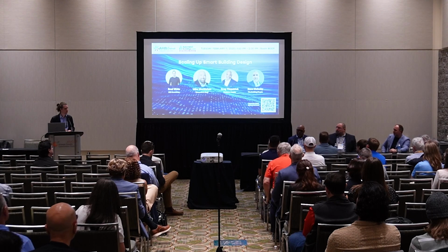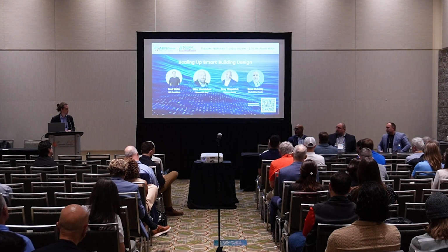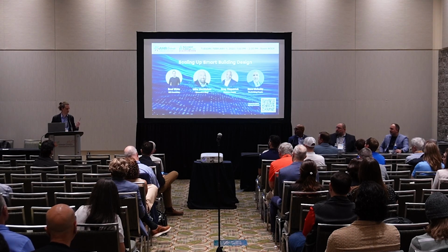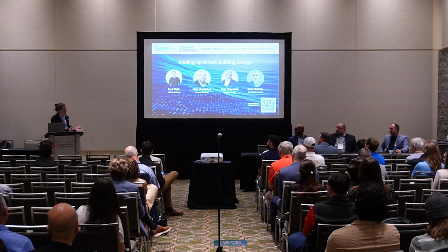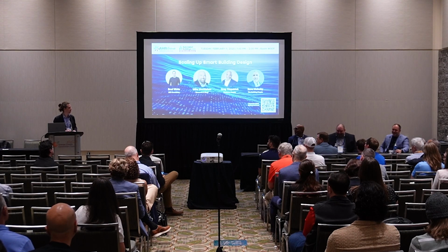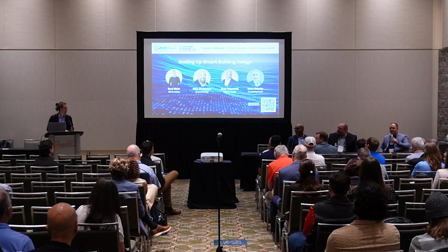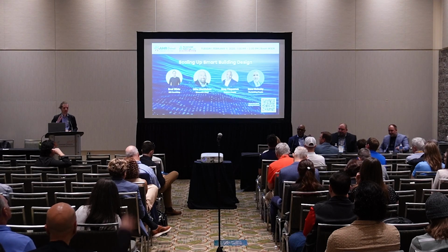Yeah, the commissioning agent should be involved in design reviews. They should be involved in shop drawing reviews, all the way through functional testing. I always shake my head every time I get a request, because we get RFPs to be commissioning providers, and the project is already two-thirds of the way through construction and now we're hiring them. You're trying to have commissioning meetings, and the contractors don't have time because it's not in their budget. I get it. It happens all the time.